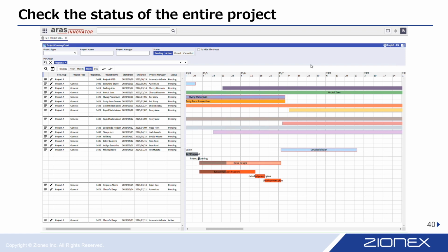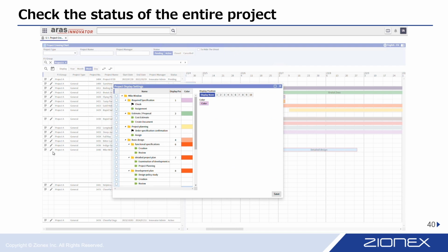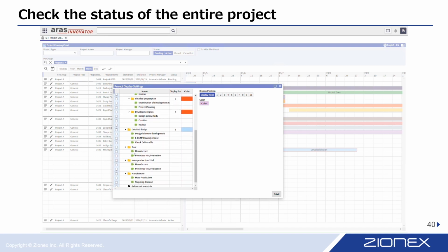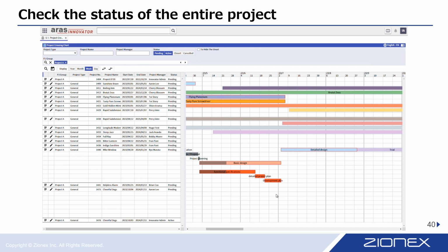You can also utilize a project crossing chart for a high-level overview of multiple projects, displaying essential project information. By configuring the number of steps and colors to represent the desired WBS, activities, or milestones from the Gantt chart tree, you can assess progress and align the schedule position with activities and milestones across various projects in the list view. This provides a valuable visual perspective on project interdependencies and progress.